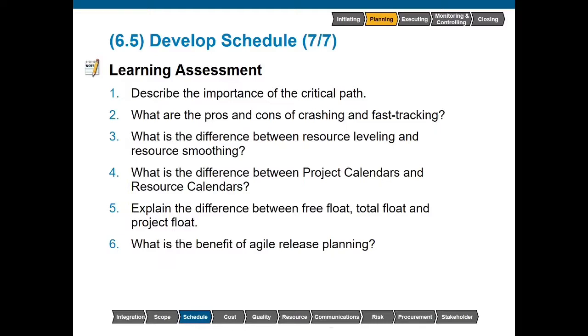What is the difference between project calendars and resource calendars? A project calendar is going to tell you what working days and shifts are available, whereas a resource calendar is going to tell you when are your resources going to be available to contribute to the project in some capacity.